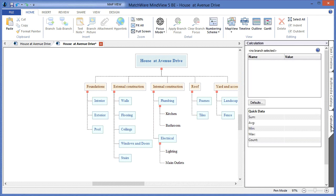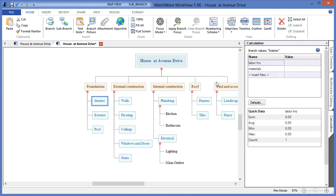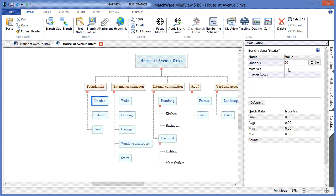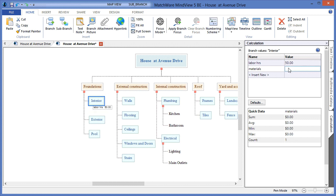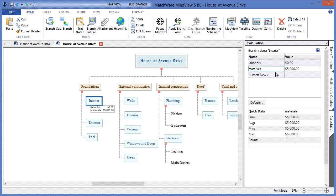By opening the calculation module, I can select an individual branch and choose to enter some specific information. In this case, I've chosen to include labor hours and materials. To display the specific information, I choose to enter a value on the desired branch. I would determine to enter a numeric value for labor hours as well as for materials. As you can see, that data is then populated on that branch itself.